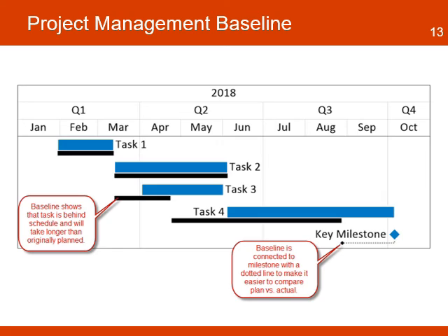There is another type of baseline that the project will use. This is related to the project management areas of scope, schedule, and budget. Each one of these components is a constraint. For each one of these constraints, the project will set a baseline. The scope of work baseline defines the total amount of work the project will do. The schedule baseline defines the duration of the project and the original estimates. And the budget baseline defines the total cost of the project and the original estimates.